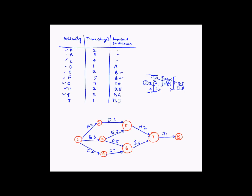As long as activities A, B, and C are aligned tightly to complete in seven hours, the project will be on time. This is why project managers focus on the critical path to determine whether the project is going to be delayed. The critical path is defined as the longest duration path between the first and the last node of a project.